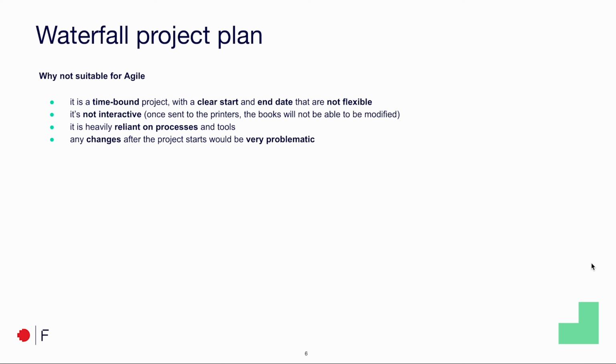The project management for the build of this product does not fall under the Agile methodology, even if it's built within the EdTech space, where Agile is most commonly used. Some elements from Agile methodology, such as multiple rounds of QA, going back and forth between designers and authors until a lesson is completed, can be seen, but the overall project is not an Agile project because it is a time-bound project with a clear start and end date that are not flexible.